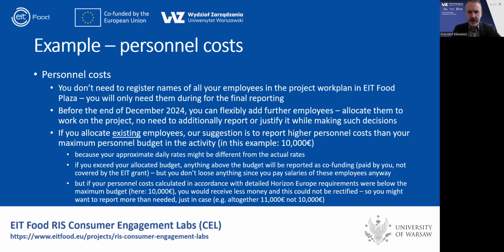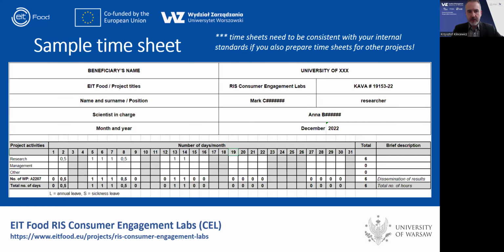And apart from personnel costs, which you will need to report by the end of December, you will need to make sure that you register the time that people spend on the project. Again, it might be that your institution already has a standard IT system or documents that are timesheets. If not, then you can use default solutions proposed for Horizon Europe. But again, this is probably something that you need to discuss with your research office, accountants, or national contact points to make sure that you are doing this in accordance with the national legislation and the standards for personnel management.